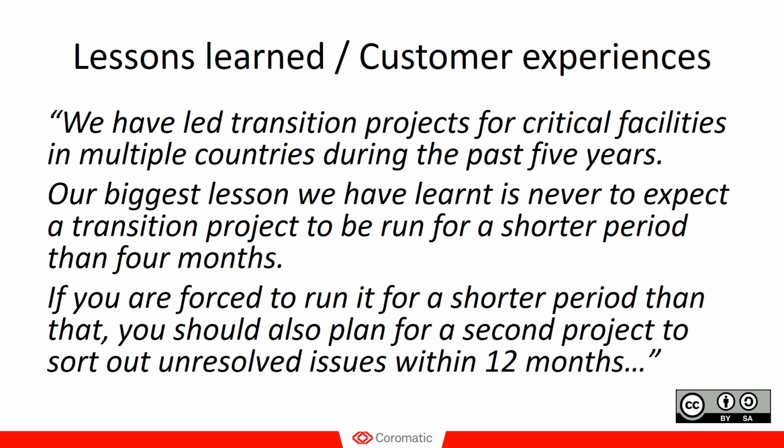And 4 months is an extremely pressed schedule, and it is for a clearly limited number of sites, perhaps only one site in one location. Because as they say, if you're forced to run it for a shorter period than that, you should also plan for a second project to sort out unresolved issues within the next 12 months. It will not be enough if you go below 4 months, and 4 months is really at the low end.